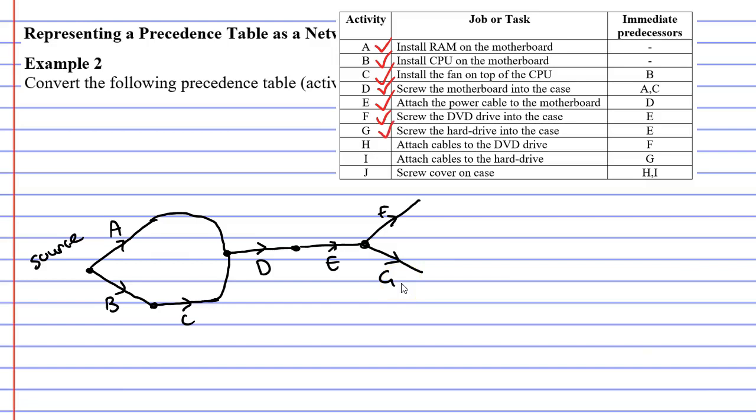Now moving on to activity H. Activity H comes after activity F. So we need to finish activity F and draw an edge to represent activity H and also tick activity H. Next we have activity I which comes after activity G. So we finish activity G with a vertex and draw an edge to represent activity I.